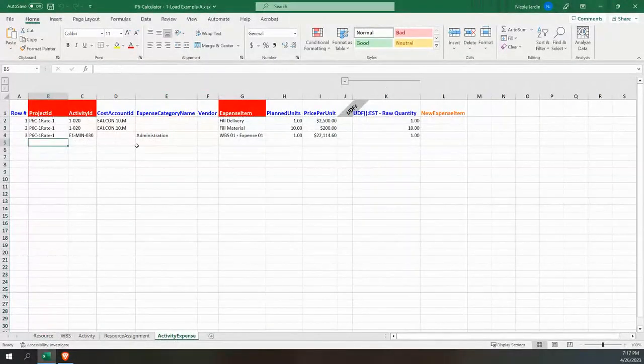And then we may take advantage of the expense piece in P6, okay? So the expenses have a place for many things. We've got quite a few clients who use the expenses, and it's usually for things that you don't need to look at limits. That would be one reason to use an expense. And if you do need to look at limits on some of these things, then use resources, okay? So things like travel, things like administrative type costs have a very good home here in expenses.